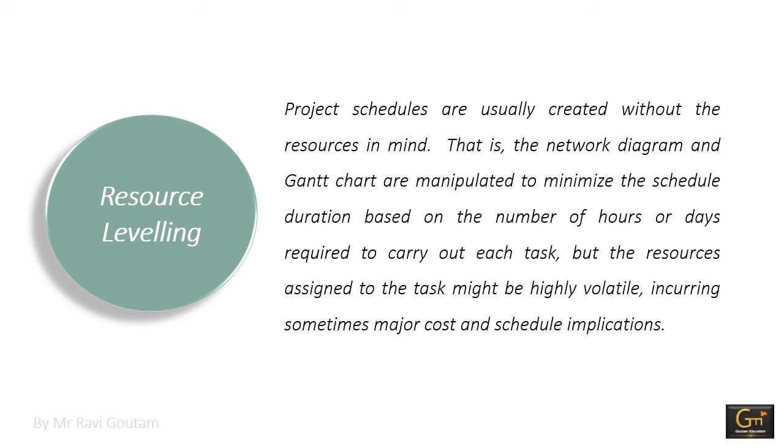So resource leveling refers to the process of inspecting the resources to ensure their use is as smooth and level as possible. It is a common scenario that it is more advantageous to extend the project schedule to avoid large peaks and dips in resource use.